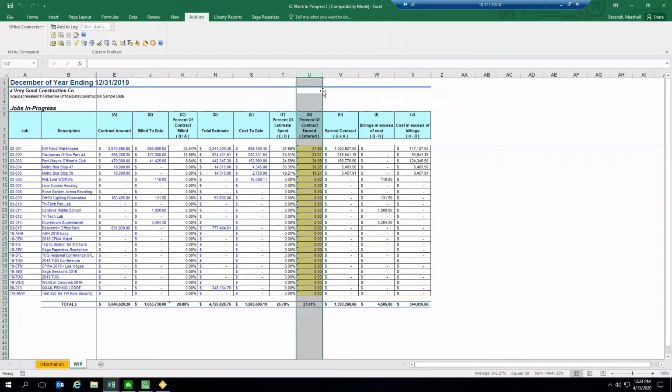And so if we entered in the percent of contract earned here versus the estimate, then we can see how much we're actually billing in excess. So perhaps we haven't quite earned enough of that contract, and so perhaps we have billed in excess. You can use this report to help make those adjusting entries. And as James suggested, those cost to complete, or however you're determining that, feeds into these type reports. So it's important to evaluate these different aspects when looking at these reports.